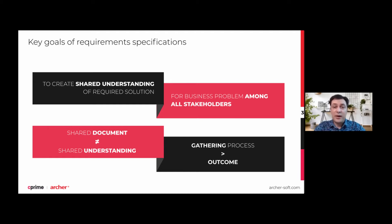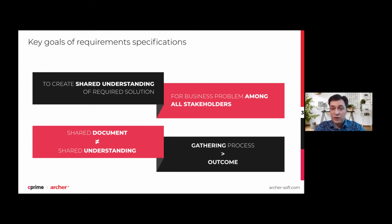You'll have to find a balance between getting too detailed — possibly wasting available time — on one side, and quickly making an efficient description that can be put into action right away on the other. I remember we had a client who had a good SRS and we made an estimation according to it. Our estimation seemed quite big and he left us. In eight months, he appeared again with a much more detailed SRS and asked us to estimate once again. With the more detailed SRS, our estimations grew bigger. But during those eight months he spent on the more detailed specification, we could have actually developed the software, getting more details in parallel. He just wasted his time.